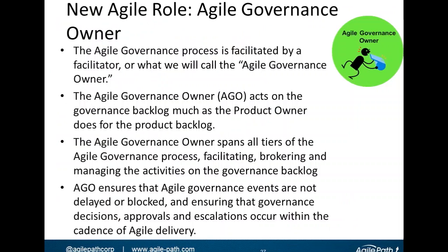And then what we would do with those is put those on a fast track for an escalation and a resolution quickly by either the Agile community team or by the enterprise. So what we're trying to do is show how you can address governance ahead of time, and then for any emergent governance requirements that come out of a sprint planning session, you can either spike it and address it that way, or you can escalate it and get resolution that will fit within the 2 to 4 week sprint execution cycle that we're normally used to.